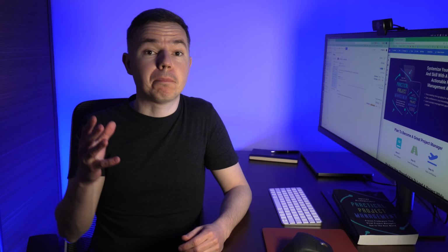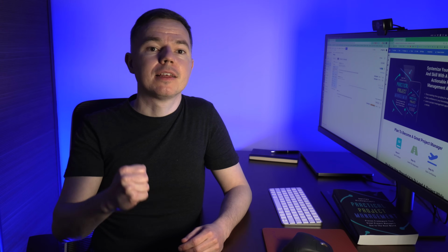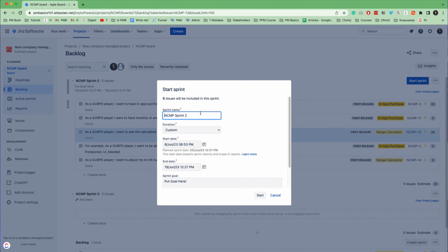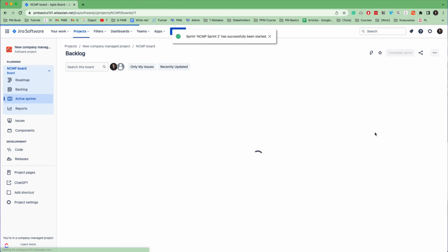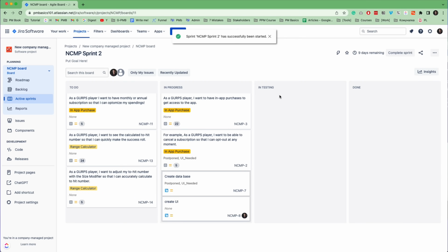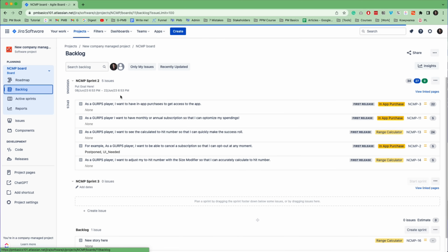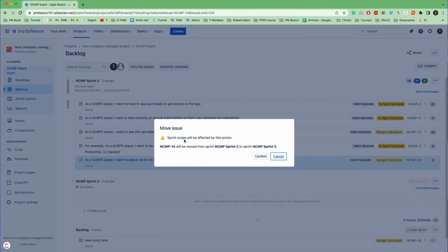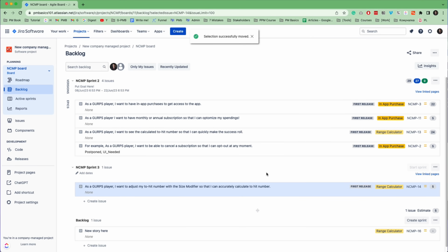The last step in the backlog is to start the sprint. So, click the button, check the information and start the sprint. But remember that Jira will start tracking your progress after you begin the sprint. And in Scrum, you'll have your burn down chart. That's why if you change estimates or remove or add user stories, it will affect your reporting. And overall it may screw with your team's velocity.